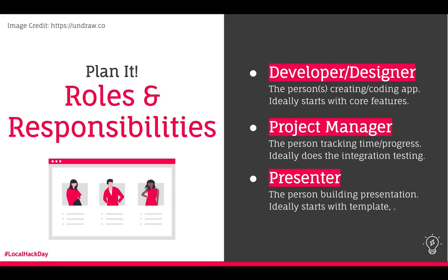And the role of the project manager is literally to keep people on time, to understand who's doing what, make sure we're on track, and make sure you help with integration, kind of combining the efforts from various people and checking that in to make sure that there's progress being made on your project. And the presenter's job will be to kind of integrate in the details that are needed for the final presentation as you go, so that you're not waiting till the last minute. You should have something ready to go the minute your demo's done.